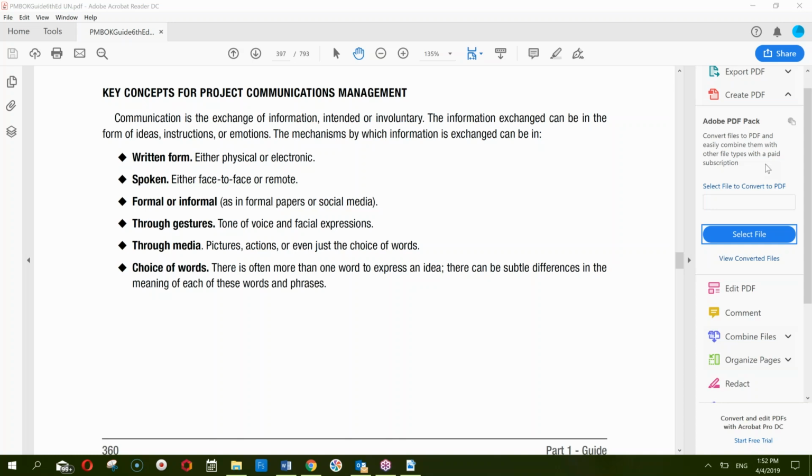And my team is a stakeholder, my boss is a stakeholder, my organizational people are stakeholders, outside parties are stakeholders. So all those who have been identified as stakeholders can have the communication channels. But in my communication plan, I will define which communication channels to open and when they are to be open, what are the conditions. So this has to be specified.